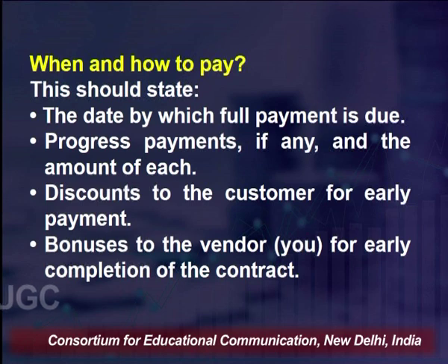So the date by which the full payment is due, the progress payments if any, and the amount of each. What do we mean by progress payments? In case we are making installments, we need to mention the amount of each installment and the date by which those installments will be paid.